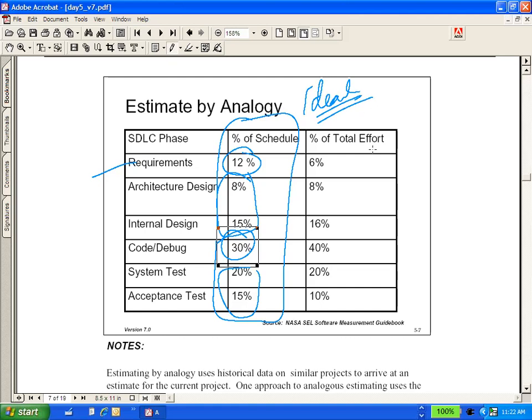What happens in real life? Sometimes coding takes so long, but the go live date cannot change, and therefore what suffers? QA suffers. It's very common because QA is at the end of the SDLC. Requirements took longer, design took longer, developers were out partying, and finally we have 5 days left for QA. We still had to go live on the 101st day, right?